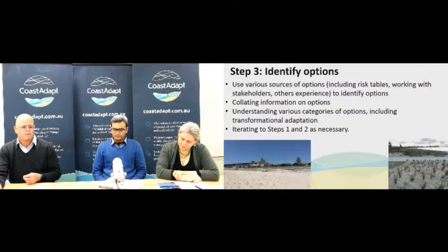You need to think about collating various bits of information about each option, the costs, how long it takes, what any risks might be, and so on. And again, you can get details from that within C-CADS. And you can start to think about some of the things that you have, like win-win situations, those sort of options that provide you immediate benefits versus those that are going to be more reactive to bigger climate change effects when they occur later on.